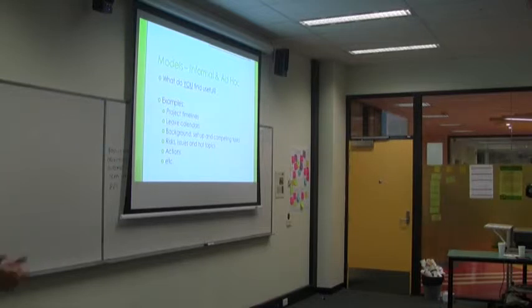And I thought, well, if I'm going to put something up on the wall, I want to make it valuable for me and for people around me to get useful information. So the first thing I did was create a calendar timeline with little sticky notes of all the key events that I was planning to do for the release. So where my iteration cadence was, what dates each iteration started and stopped, and then each of the activities that occurred within those iterations.